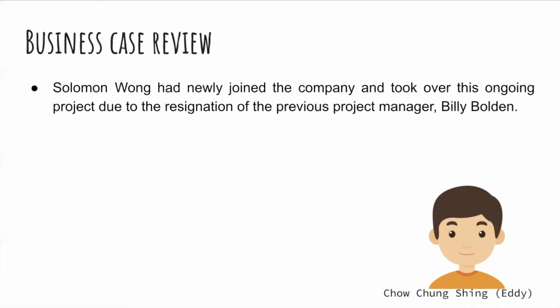The previously collected requirements were vague and dubious. For instance, the clients requested the system to be user-friendly and the user interface to be beautiful. However, none of these requirements were clearly defined, and Billy failed to elicit them from clients. The details for both functional and non-functional requirements did not have enough information. The requirement traceability matrix that lists requirements and their various attributes was missing as well.